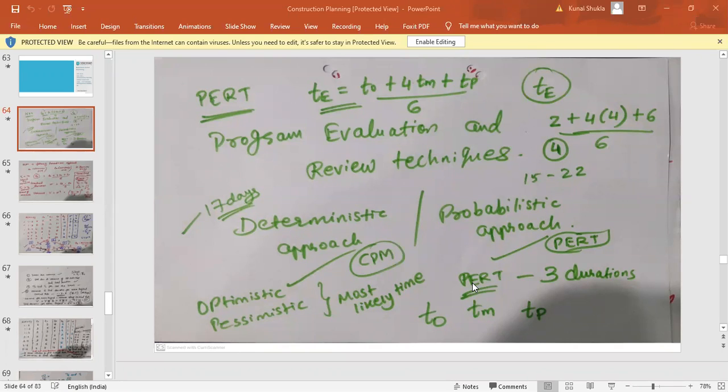Similarly, if I want to calculate the square brackets and triangle brackets in the PERT method, I require one time estimate out of these three. In the examples you calculated, there was a specific time period, so you went on adding in the forward pass and subtracting in the backward pass. In this case, with three time estimates, you cannot do that.